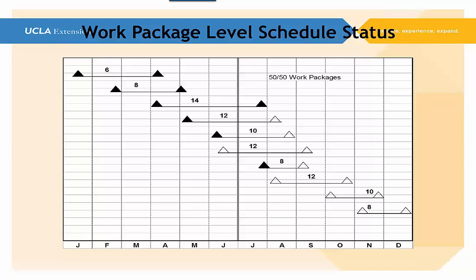We also look at the next one, which isn't supposed to start until almost the end of the next month. And it's already started and got 50% complete. And so it must have started very early. Now, will that early start offset the one that hasn't started yet? You don't know. That's why this kind of chart presents certain information, but it really does not help you do analysis or really understand where you are on the project.